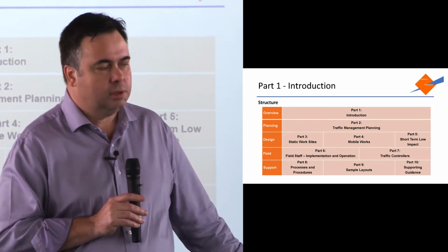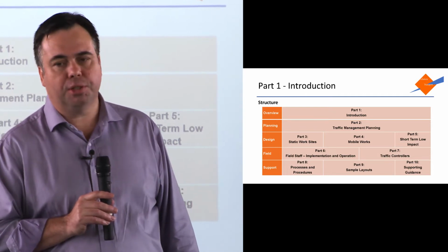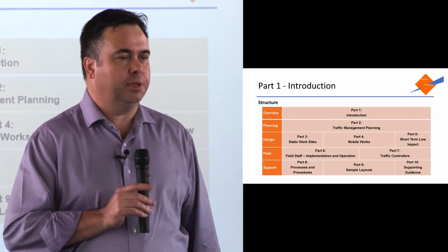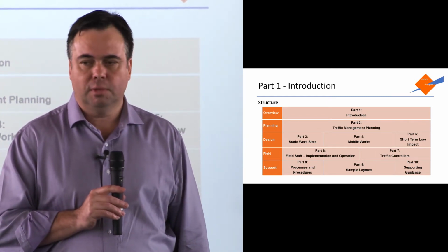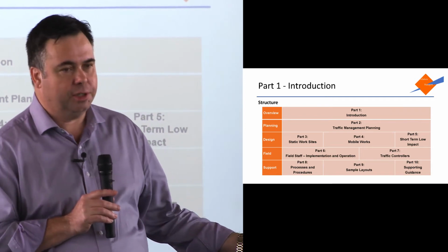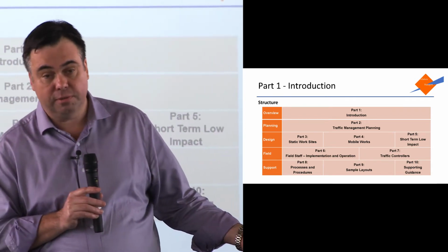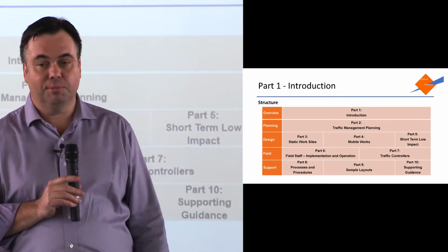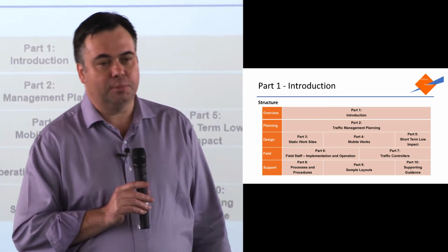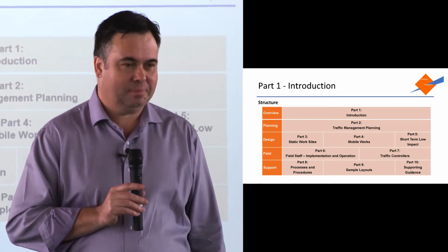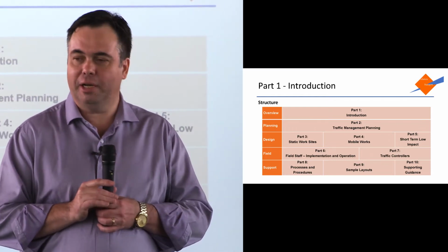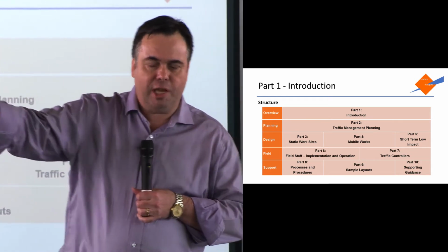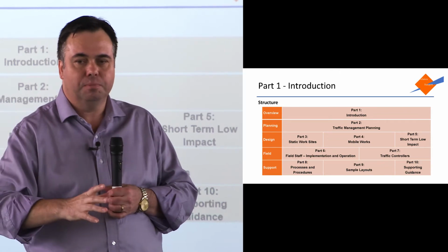So that's step 1. Step 2, they said, if it's a metre or more tall or high, you must get a structural engineering building approval for that structure. Now, I'm an engineer, but I'm a traffic engineer. I'm not a structural engineer, so I can't sign it off myself. Do I want to employ a structural engineer to sign off a retaining wall? Not a chance. I'm not paying for that. So I found a system that's 980 millimetres high. I looked around and there's a lot of manufacturers that have these systems that fit just under that metre. I've got one of those. It means I have to have a step part way through that area that I want to level, but that's cool. So that's me planning the job.